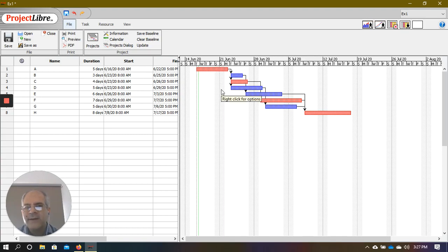So by default, the software is thinking that Saturday and Sunday are off days for you and Monday through Friday are working days for you. So not only is it taking 5 days here as the duration of A, it is adding 2 days to it, which are non-working days, right? So basically starting from Tuesday and finishing here at the end of Monday also includes Saturday, Sunday as off days. So this view is called the Gantt chart, right?